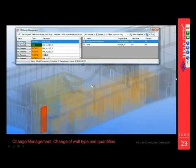Now you can see here, it picks up things. It picks up the whole thing. What's deleted, what's new, what's modified, and this is all based on what you asked it, because you're asking, has there been any change between the names or the net side area? And here you go. You've got one piece deleted,